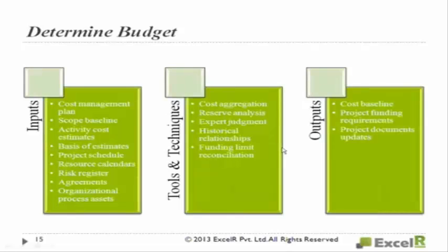Remember, when I say budget has to be developed, it is not just the final budget itself. For a 6 months project, the budget for the whole 6 months is say $10 million. But periodical budgeting requirements also you should give: this month, how much money I require. In 1 month you may require less money, in the other month you may require more money.